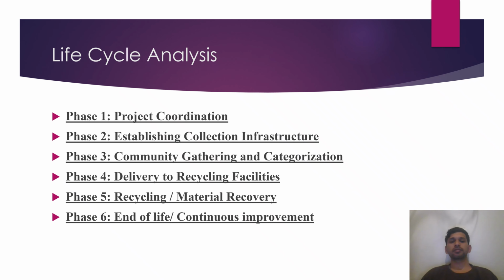Phase 3 involves community participation. Residents will be informed about what type of e-waste to bring, and the collected items will be sorted and categorized. In phase 4, the collected e-waste is safely transported to authorized recycling facilities. Phase 5 includes the recycling and material recovery process, where electronic parts are broken down, valuable materials are extracted and hazardous waste is properly treated.